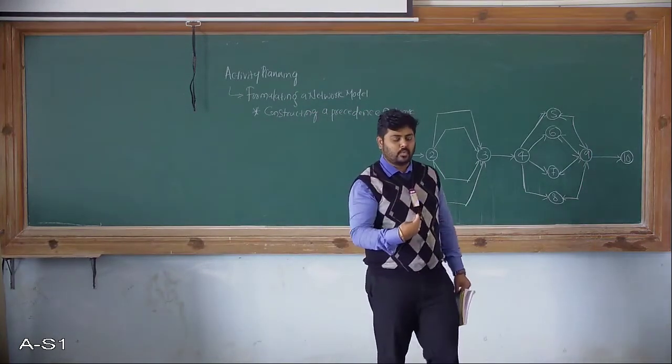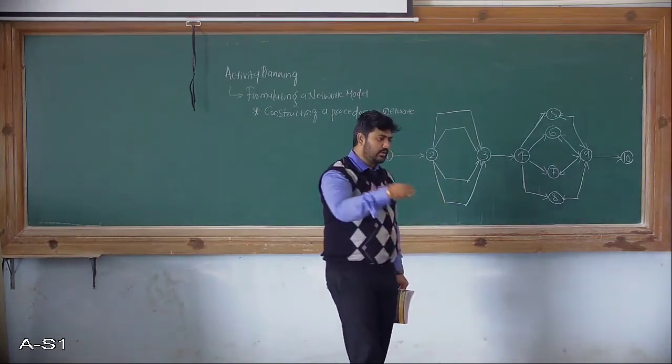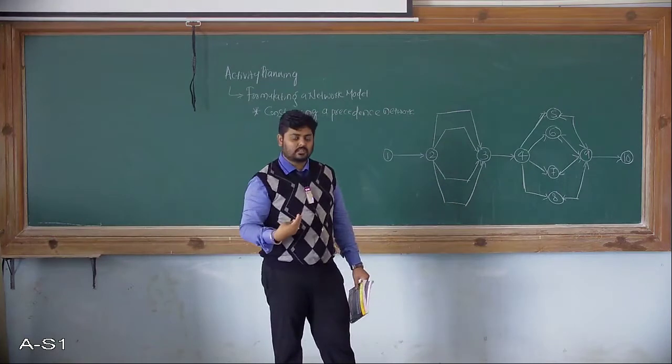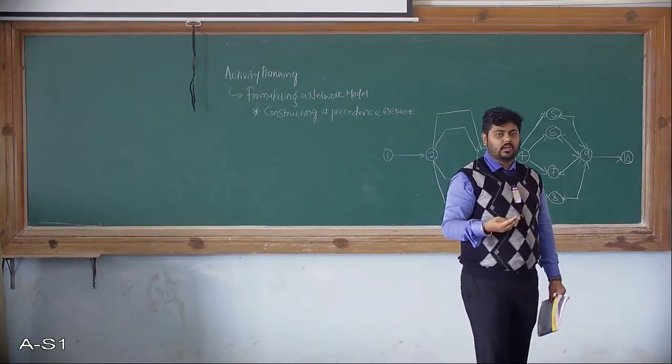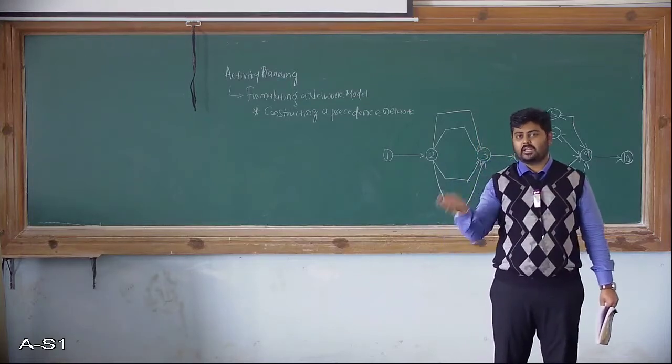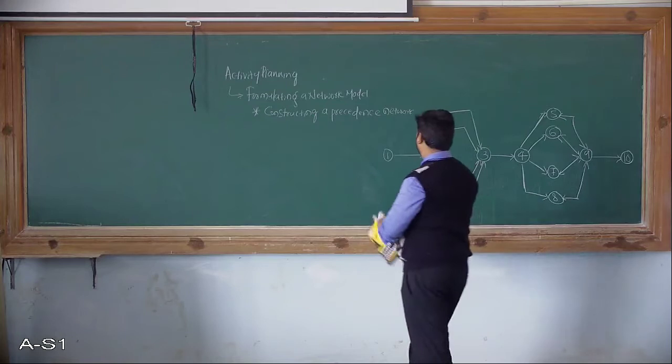So for sequence 1, fine, then it will be module 2, then module 3, module 4, and some of the modules are independent of the other modules, so they can be developed or built in parallel based on the resources available, fine.